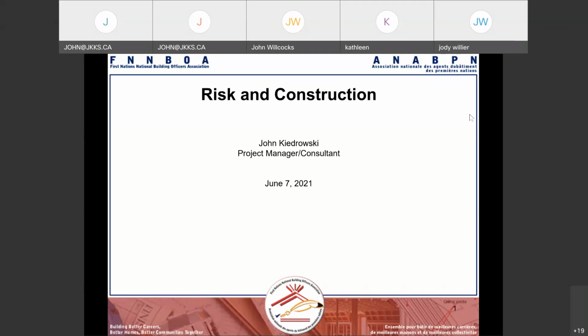But in terms of mitigating the risk, we would go back even further, right from the very beginning: proper procurement, clear understanding of technical specifications, clear drawings that have been stamped and identified. That would minimize the risk or the problem that you run up against now. So the better the upfront information, the clearer it would be for the end results.